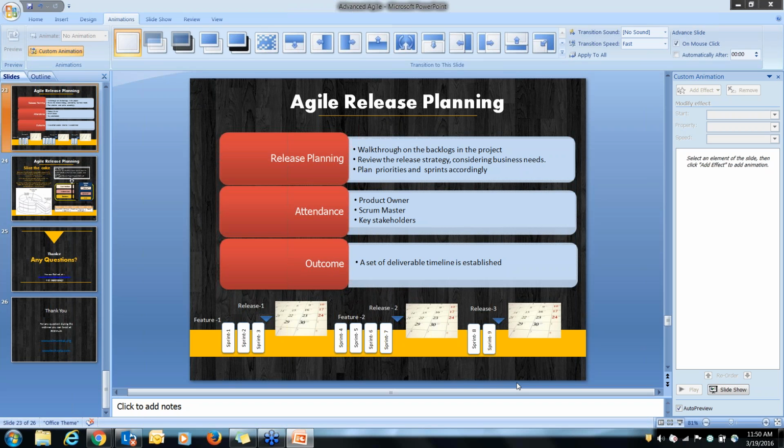You can give the demo session after the first 2 sprints, saying that the first sprint was more of a technical development, and then we will be giving you a demo after the next sprint, but like a collective one. Or you can release it after sprint 2. So it's not mandatory, there is no rule that you should have working software after each sprint, because that's not possible in a real case. Yeah. Sometimes you have to combine.